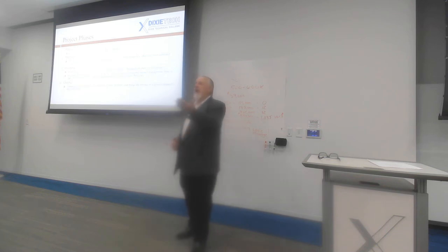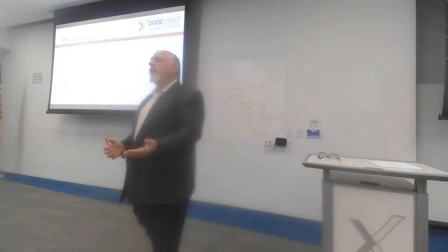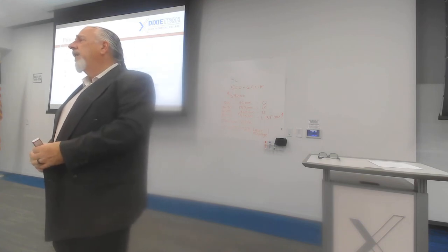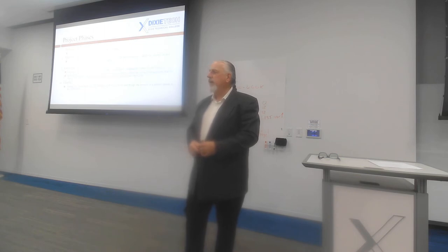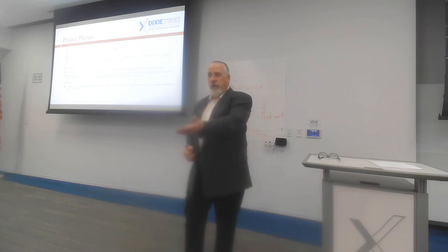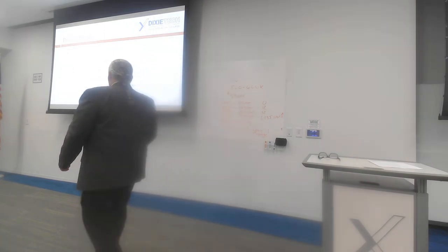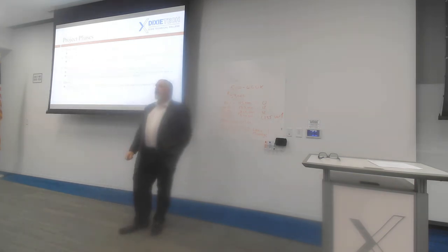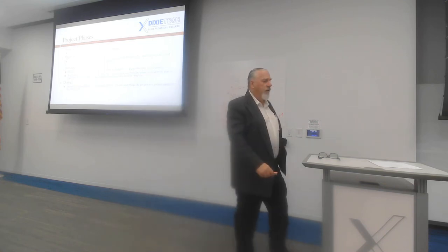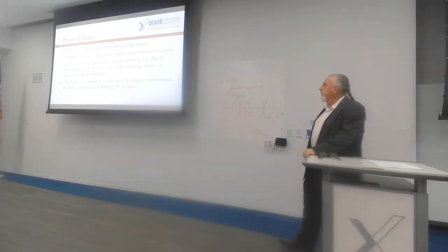Let's say you're just building a house, you're a custom home builder, and those bank covenants on the construction loans that you have while you're building have milestones, and if you miss those milestones, they may shut the project down because they're scared that you didn't pour concrete when you said you were going to pour concrete. So they have less to sell if you go toes up. And so running the phases of your project is going to depend on the lenders a lot of times, also looking over our shoulder and trying to keep us on track.